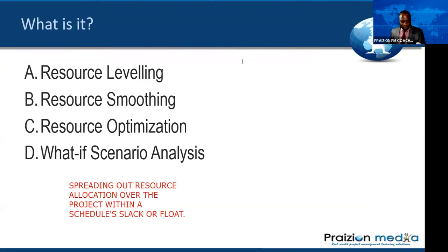But while this is going on, let me just read the key thing. Let me show you where the key thing is, all right? The key thing is on the second to the last line. You see? In other words, activities may only be delayed within their free and total float.